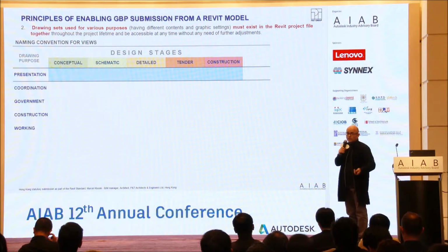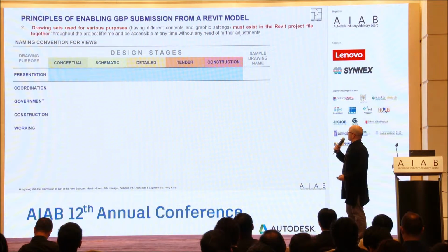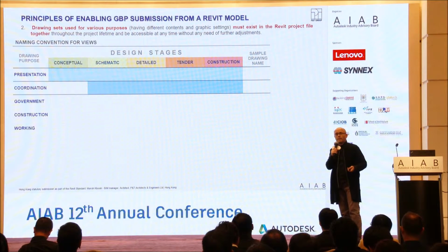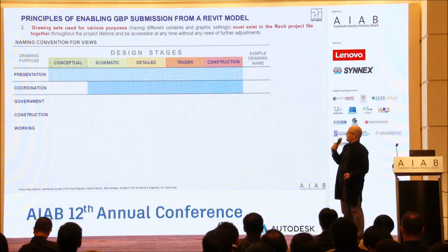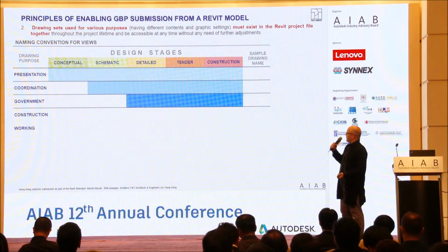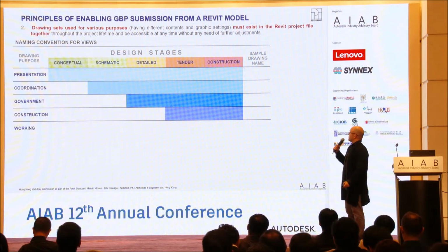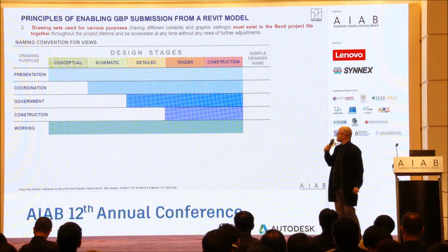Presentation actually is the one that you need from the very beginning to the very end. Coordination, producing plans for other disciplines, probably starts around schematic. Government, around detailed design when you do your first submission. Then construction is around tender. And working, you need all the time as well.